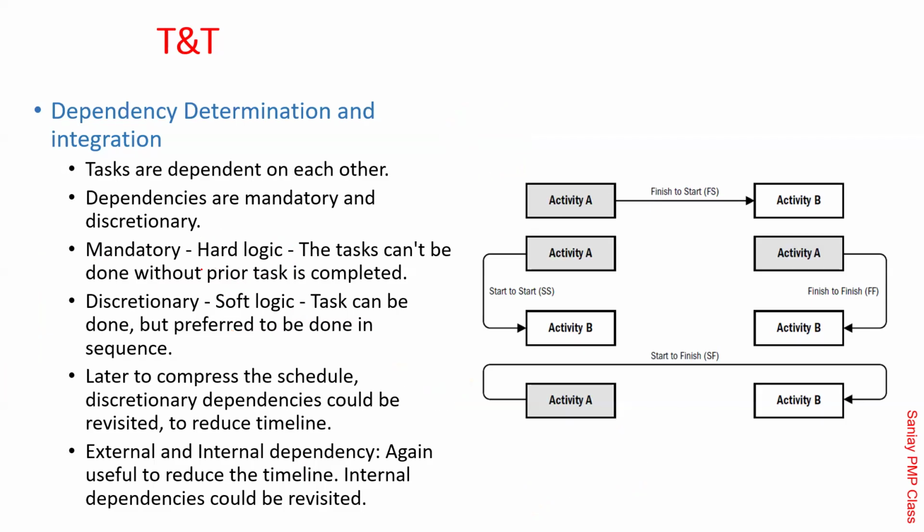But remember, every compromise in soft logic is going to add, first of all, risk, which means it adds the risk. And in most situations, plus cost. What does it mean? It might increase the cost. And remember, Swati, you said it will end up increasing, but I said might. Did you notice the difference?